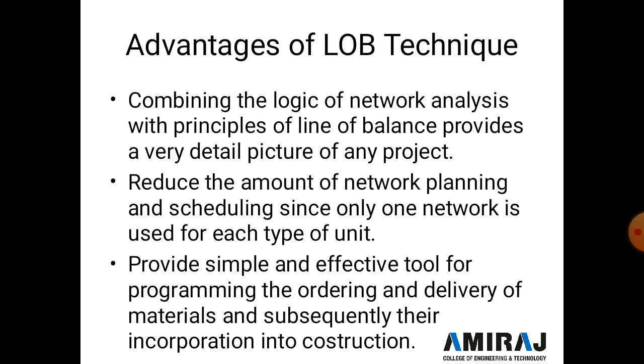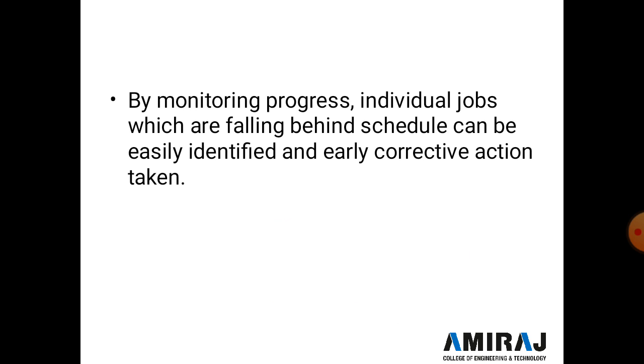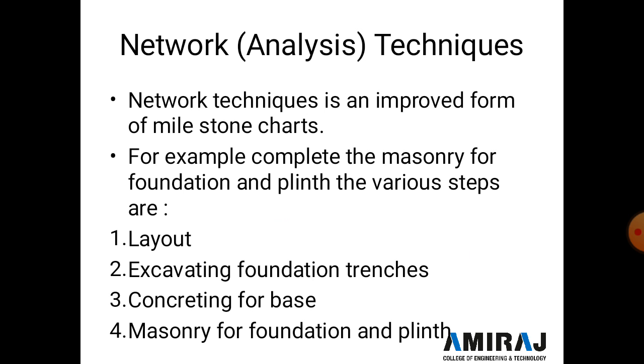Now the advantages of LOB. Combining the logic of network analysis with the principle of line of balance provides a very detailed picture of any project, and reduces the amount of network planning and scheduling, since only one network is used for each type of unit. It provides a simple and effective tool for programming, ordering and delivery of material, and subsequently their incorporation into construction. And by monitoring the progress, individual jobs which are falling behind schedule can be easily identified, and early corrective action is taken. Now in the next lecture we start with network analysis, or network techniques.